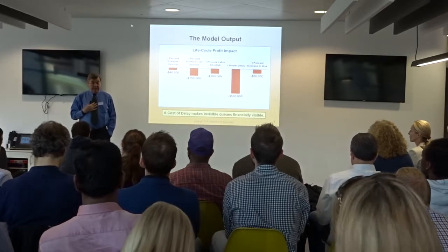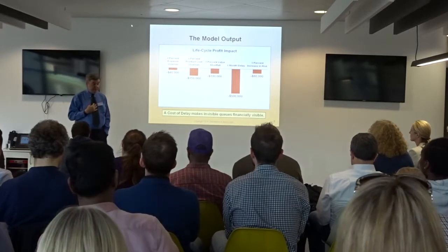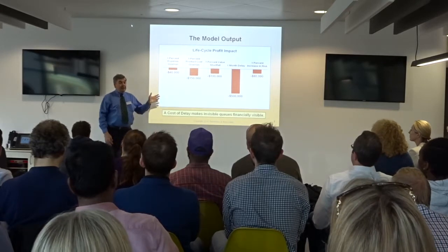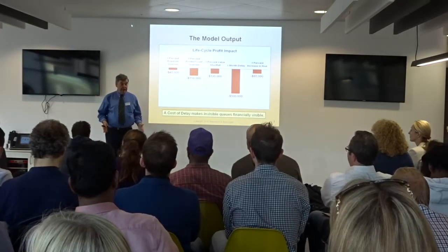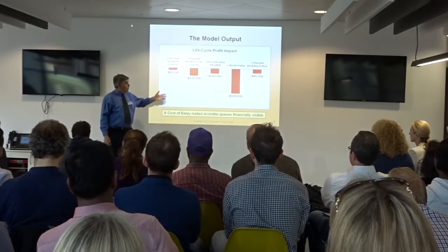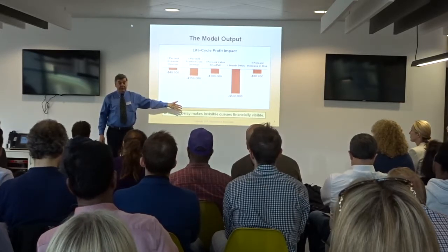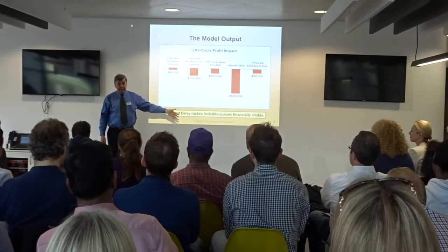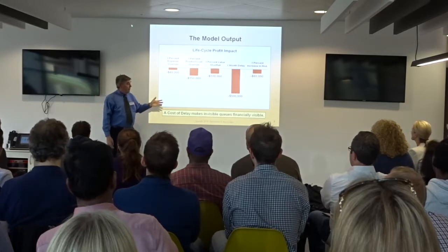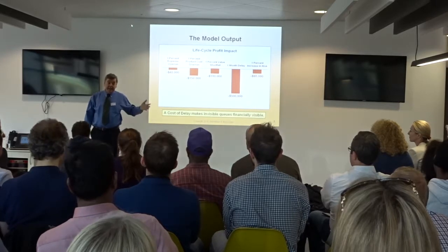What we like to see happen is it turn into a quantification of the benefits of things. So when manufacturing says, give me 2 months of extra cycle time so I can lower the cost of the product, I can say, how much will you lower the cost of the product? By 2%? Well, 2% is worth $300,000. 2 months of cycle time is worth $1 million. I do not want to trade $1 million of cycle time for $300,000 of product cost. If they say we can lower product cost by 20%, that's worth $3 million. That is a good trade-off.